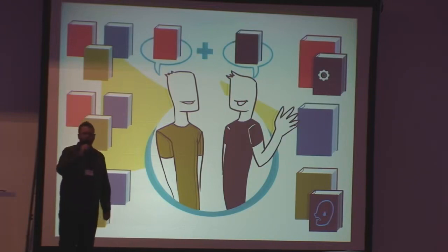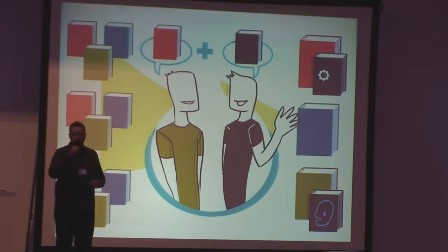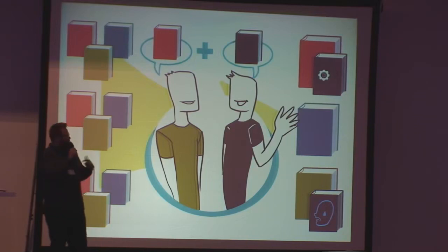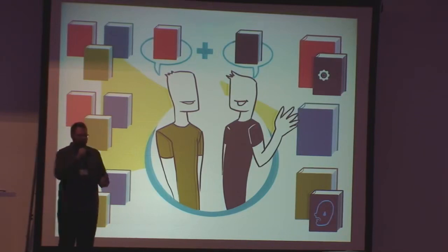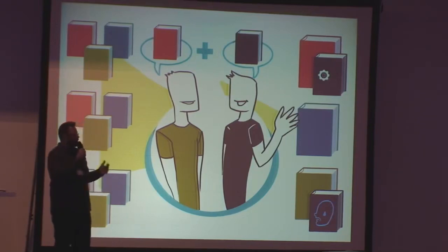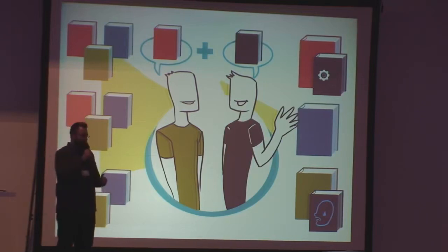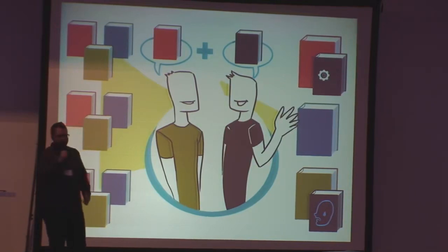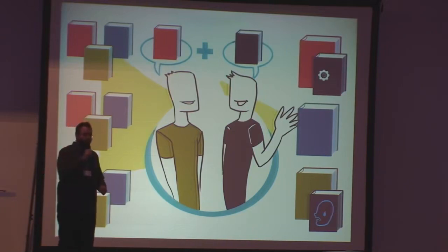And the approach we decided to take was to reduce the amount of time I had to spend by focusing in more on just having the conversation that needed to happen around security. So this meant instead of meeting with the whole team during planning, after planning, I would meet one-on-one with a representative of that team. In this case, it was a development manager who was familiar with all the work happening. And we had this meeting time boxed to half an hour, usually would come in under maybe 15 minutes.